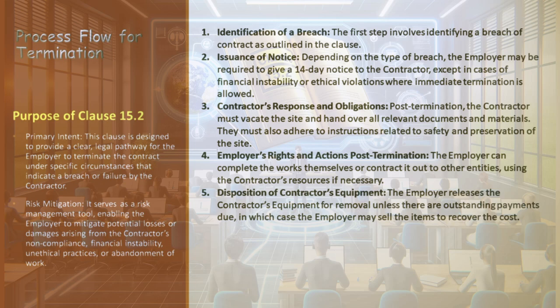Following termination, the contractor has several obligations to fulfill. They must promptly vacate the site and hand over all relevant documents and materials to the employer or the appointed representative. The contractor is also required to adhere to any instructions pertaining to the safety and preservation of the worksite and any ongoing works. After termination, the employer has certain rights: they may choose to either complete the works themselves or contract it out to other entities, and are entitled to use the contractor's resources such as equipment and materials if necessary.